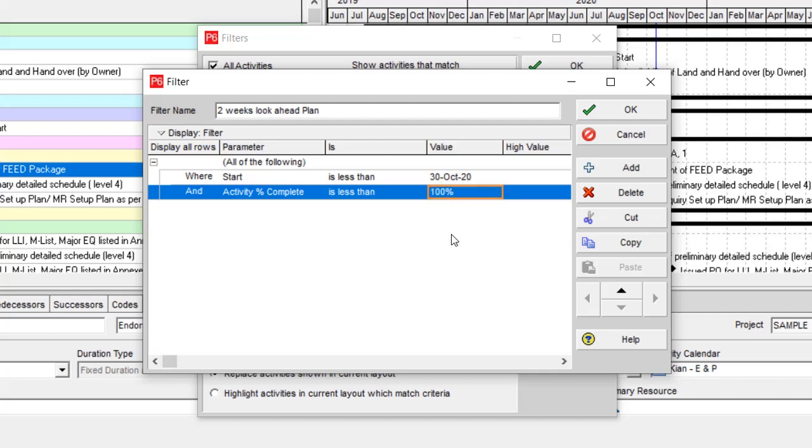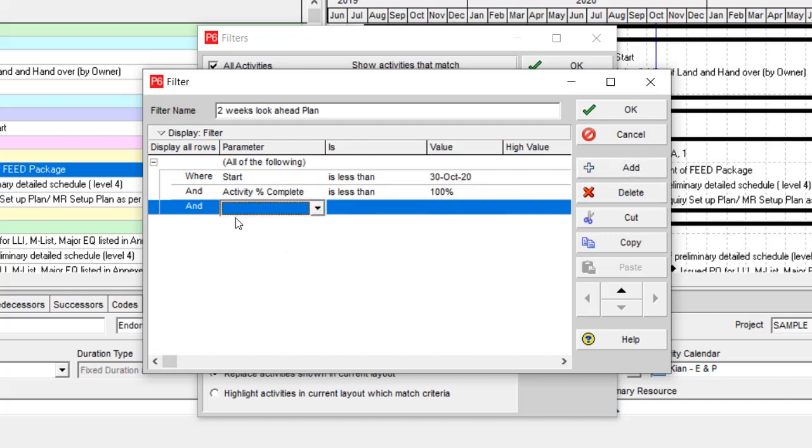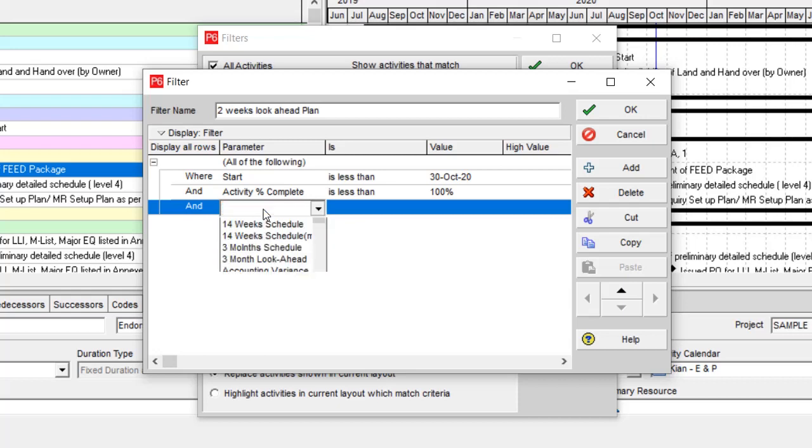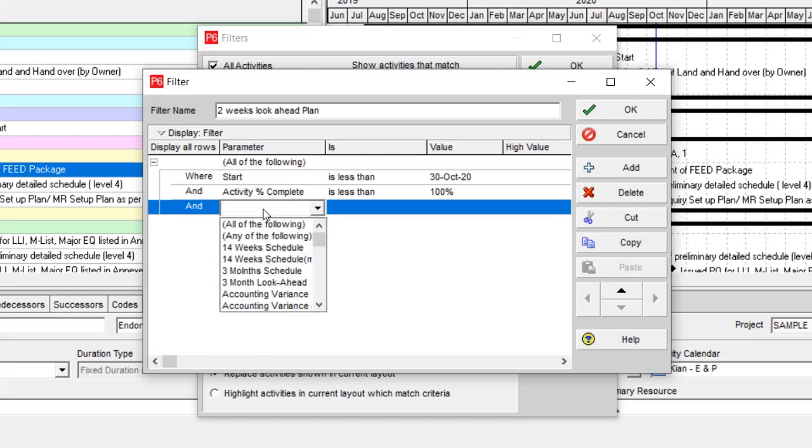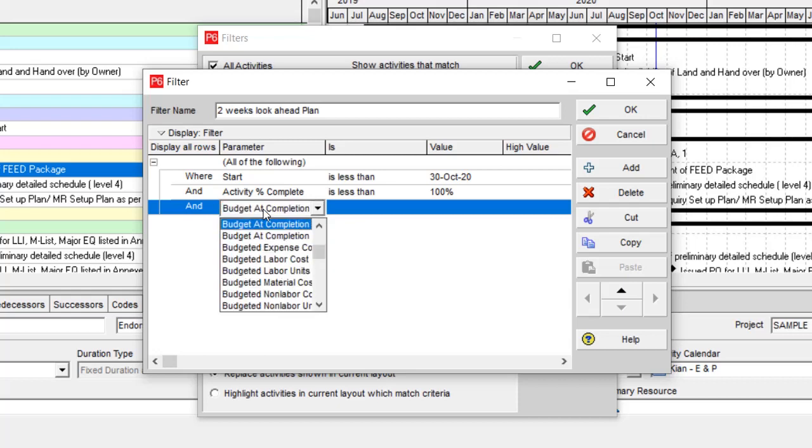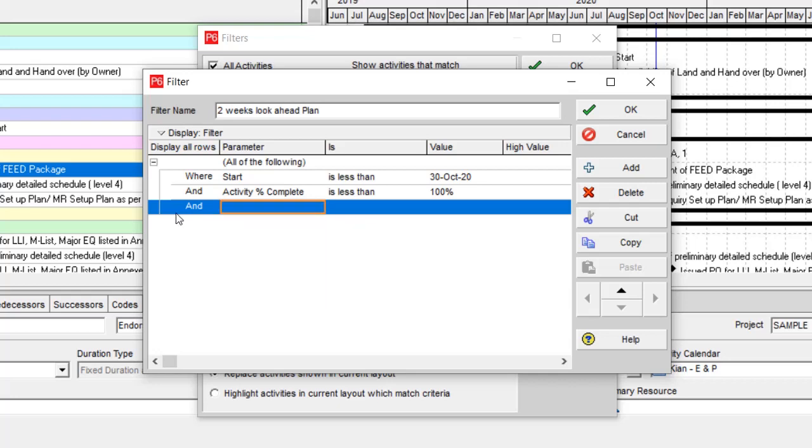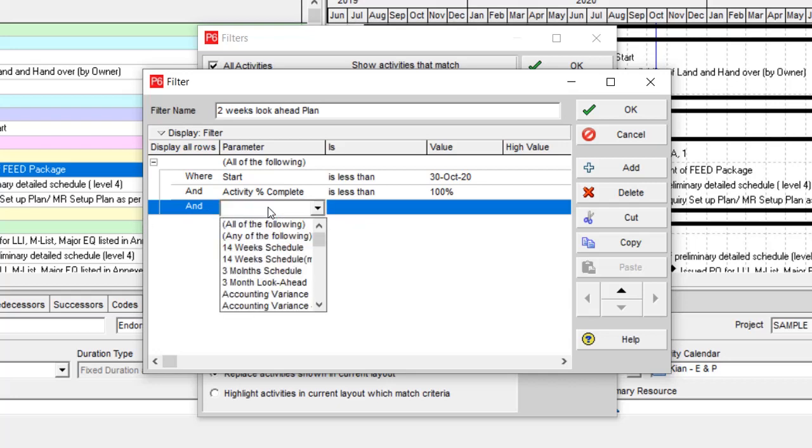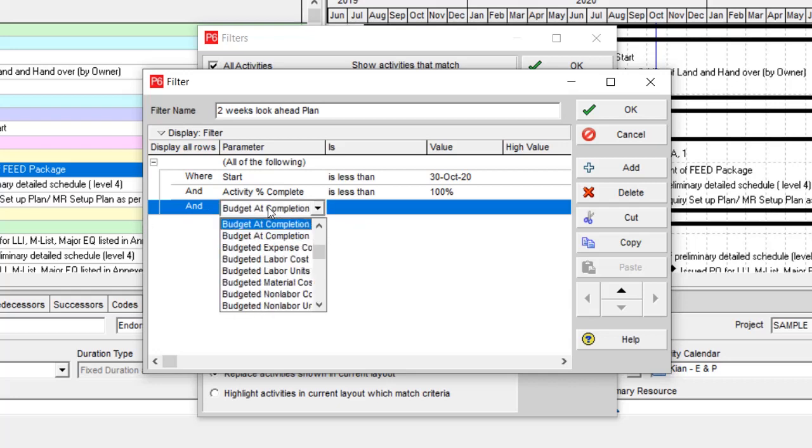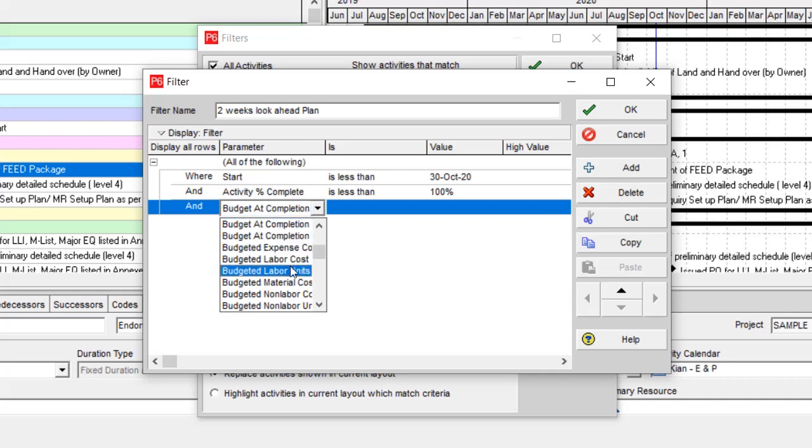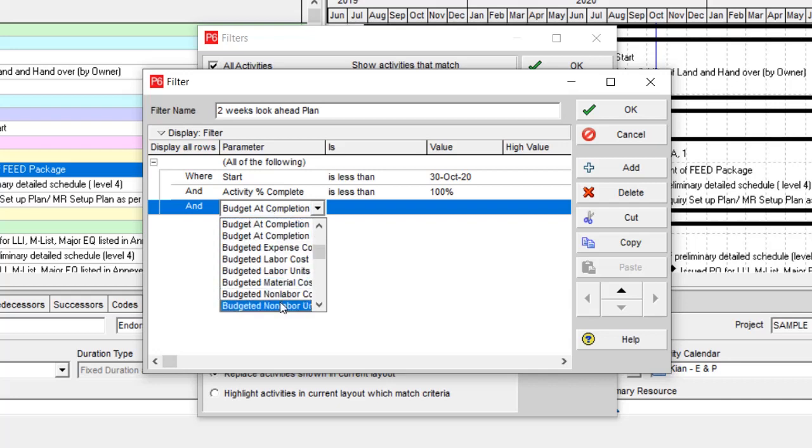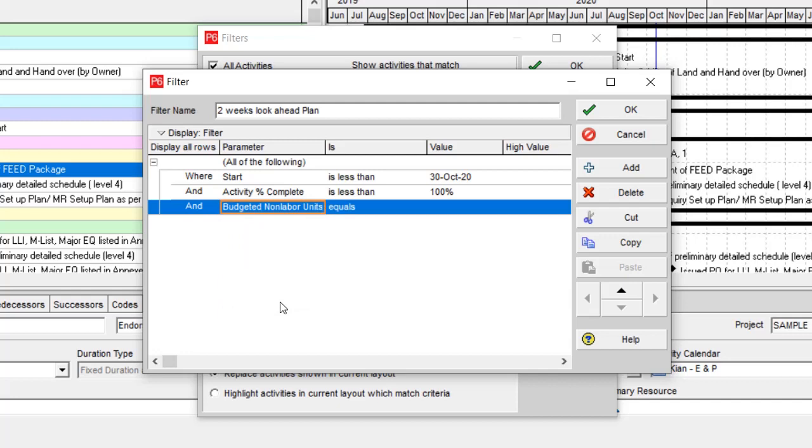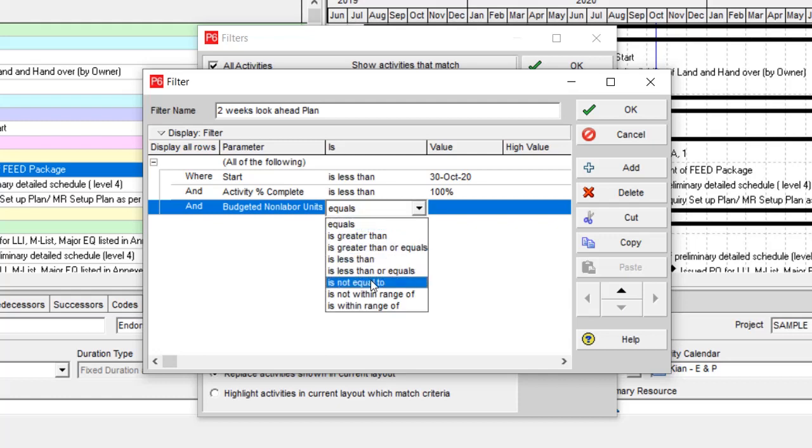The next filter is budget. I have too many activities in my project, and some of them have a budget and some of them do not. So the budget, for instance, non-labor unit is not equal to zero.